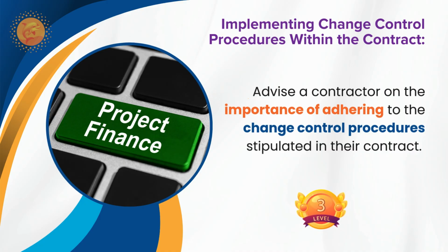Also, I will advise the contractor to identify the savings in the existing bill of quantities and existing contract sum. If a realistic saving is there and it is manageable, then it is easy to implement the change control procedure. Yes. Finally, you can add that.